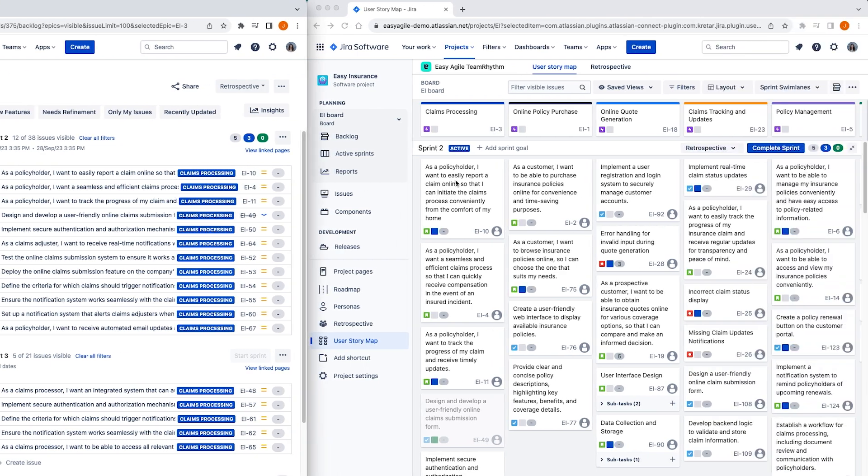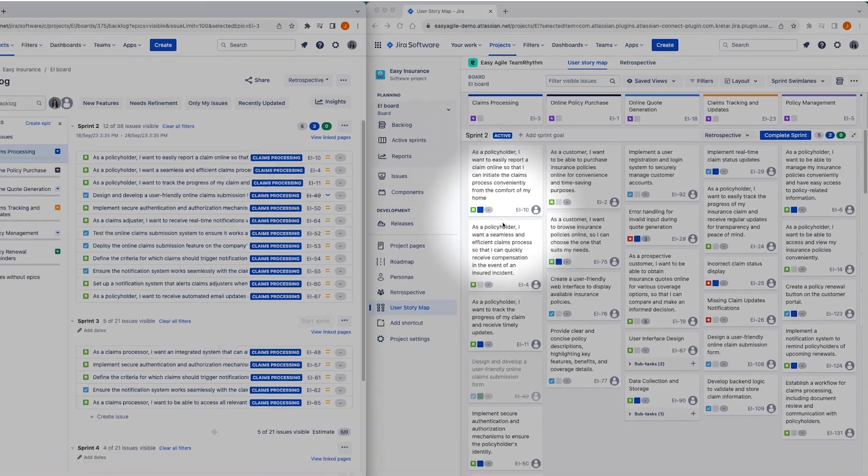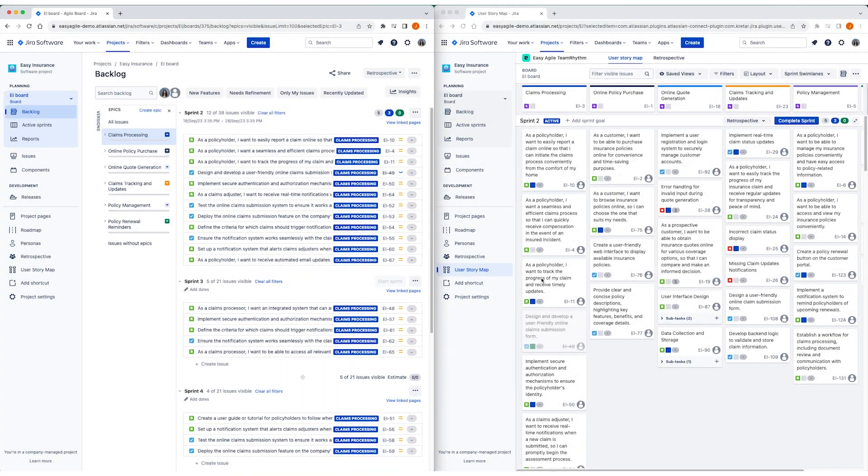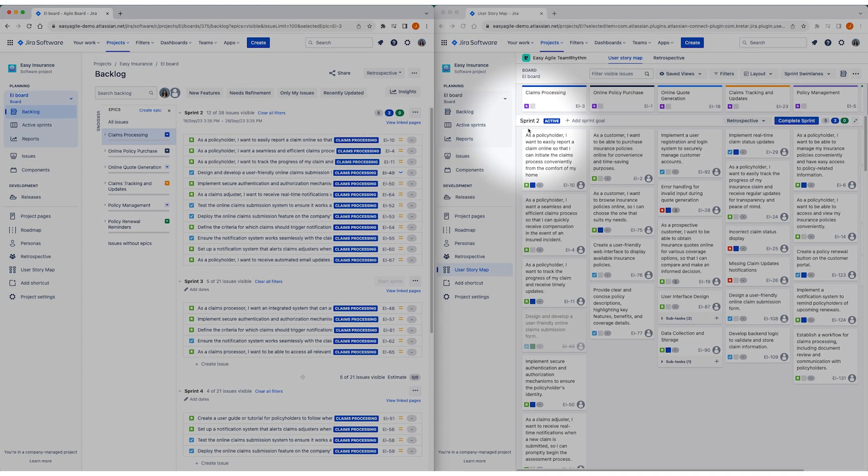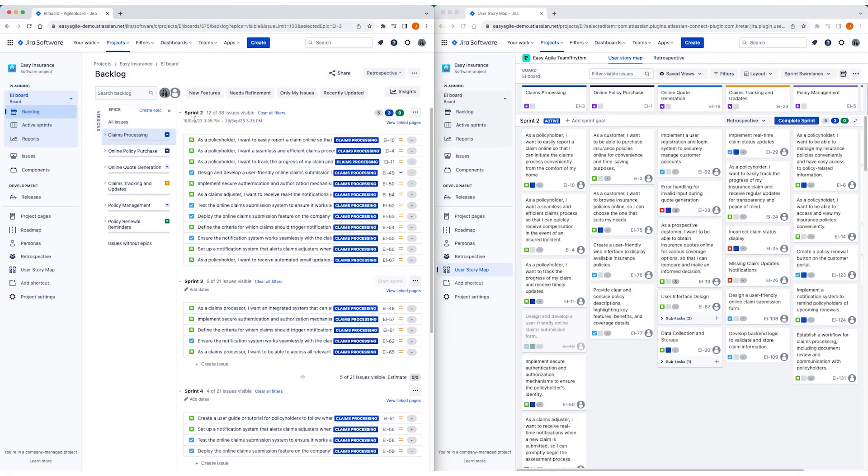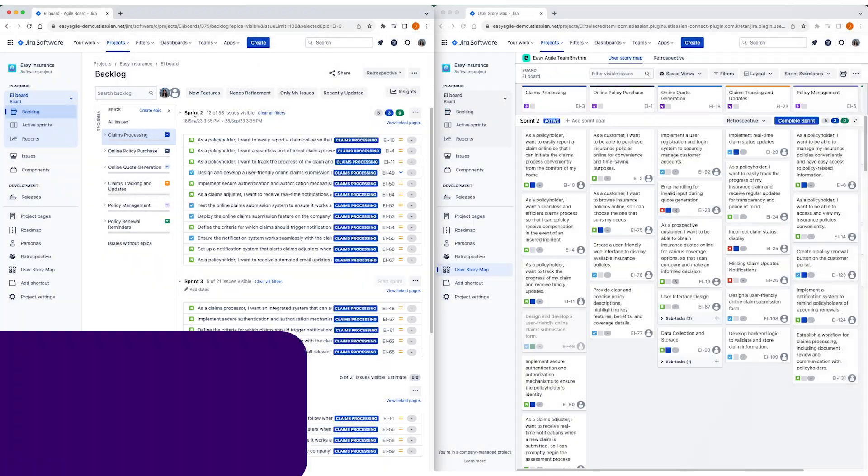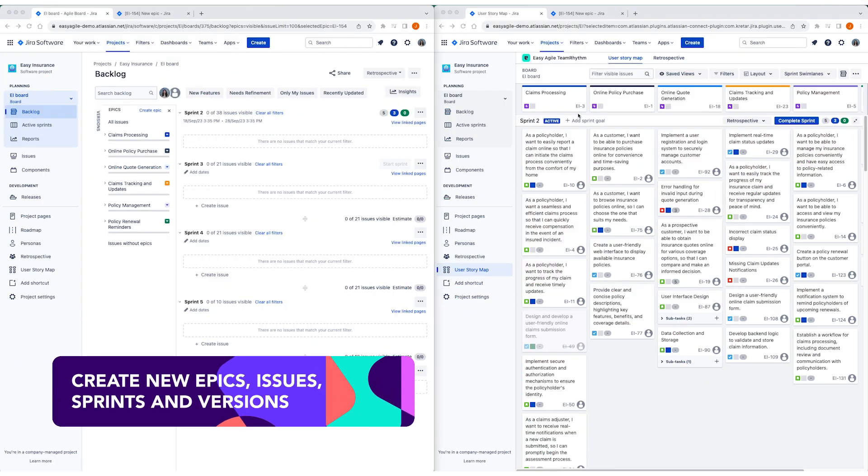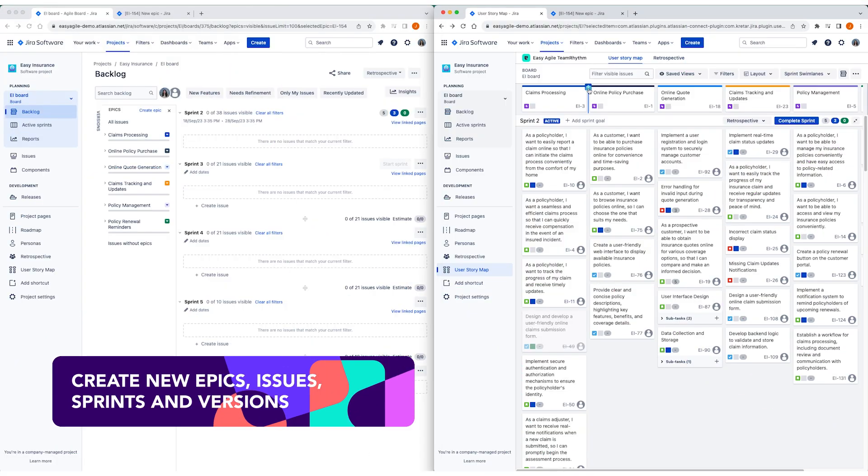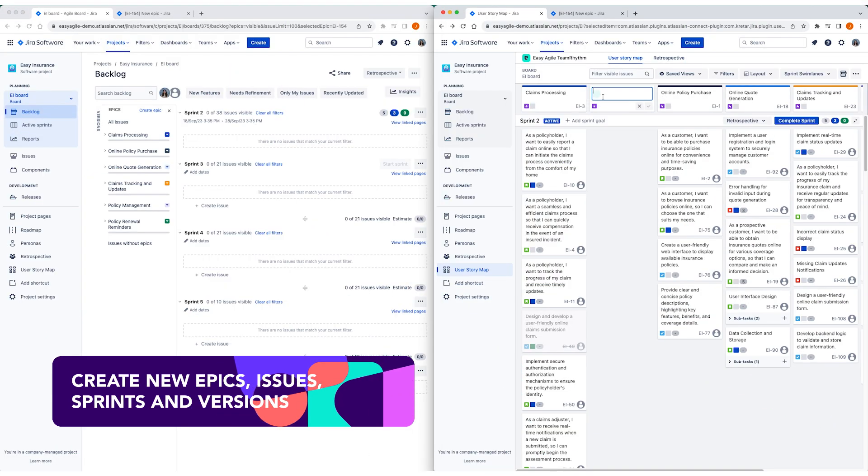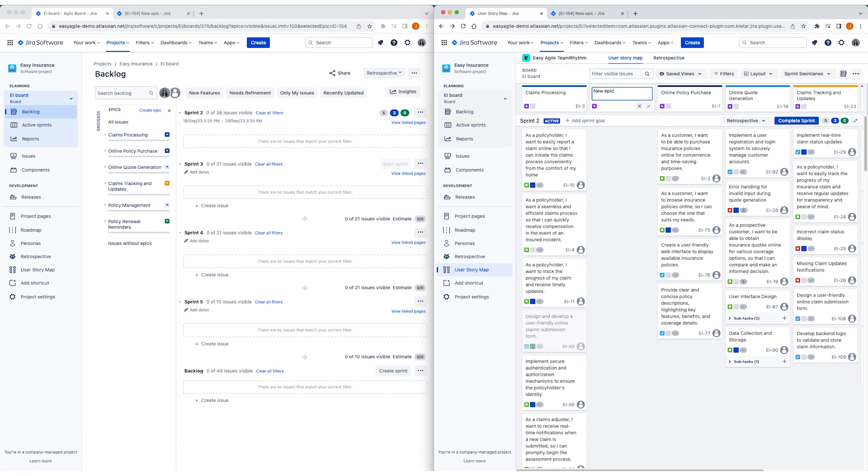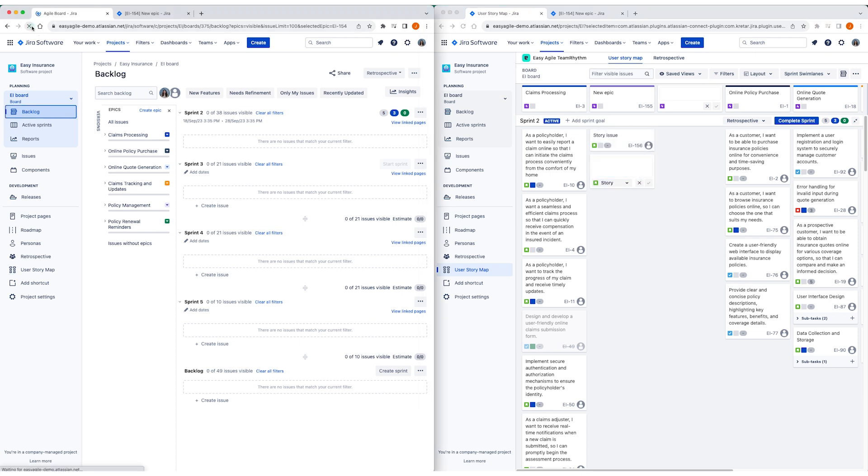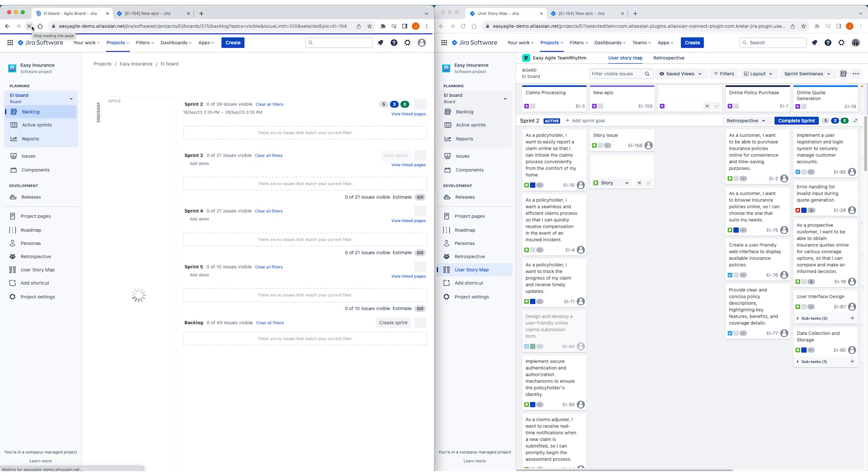The swim lanes that appear on the user story map are the sprints from your team's backlog. From here you can create new epics, issues, sprints and versions directly on the story map with the confidence that all changes made on the user story map are reflected on your team's agile board in JIRA in real time.